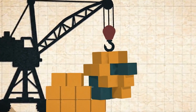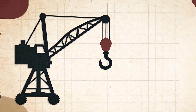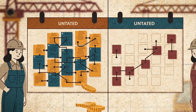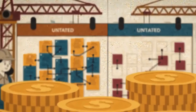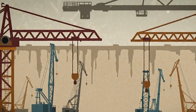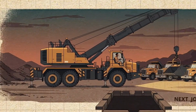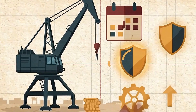And choosing the larger machine creates the next hidden cost. The site itself has to be ready to receive it. A giant crane cannot simply be placed wherever there happens to be empty space. That sounds obvious, but it changes who participates in the economics. OSHA requires crane ground conditions to be sufficiently firm, drained, and graded to support the equipment under the manufacturer's requirements. In the normal construction site arrangement, the controlling entity is responsible for providing the necessary ground preparation.